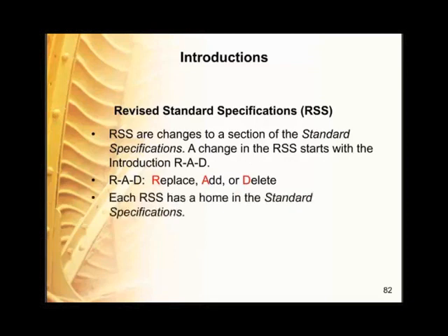The format of the RSSs and the 2010 specification also allows us, and requires, that for every specification change in an SSP, we have a home. The change in format was discussed earlier, and that's why we now have reserve specification sections in our standards. In the case when there isn't a reserve specification section available, then we use the RSS to create that new home for the special provisions.